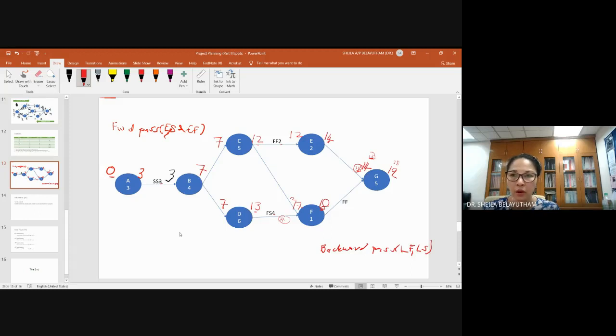To get the early start from this relationship, you need to calculate the finish first because that is the relationship. Finish to finish, G will finish together with F. F finish 18 minus 5 days is 13. So once you get 13 as the early start for G, compare it with this relationship here, where the early start is 14. So hence 14 will allow all activities to complete.